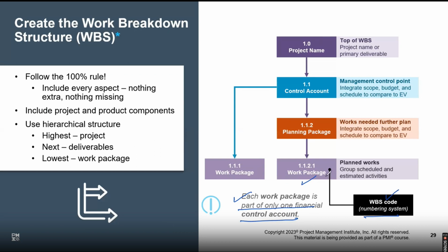Look at this. A work package is put into a planning package, and the planning package goes to the control account. A work package can also go directly to the control account, if you like. Practically you don't need the planning package; you can directly put it in the control account. The management control point is right there.